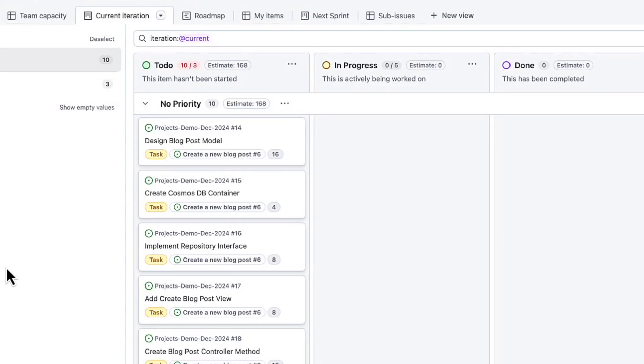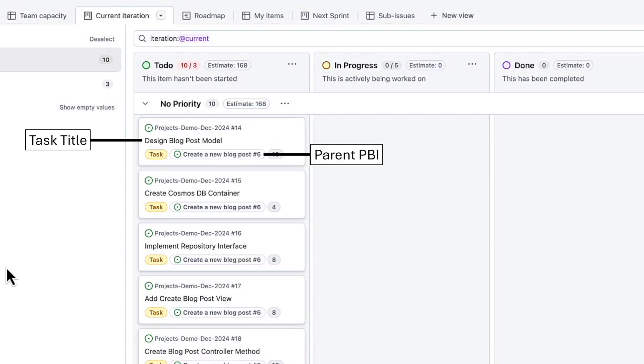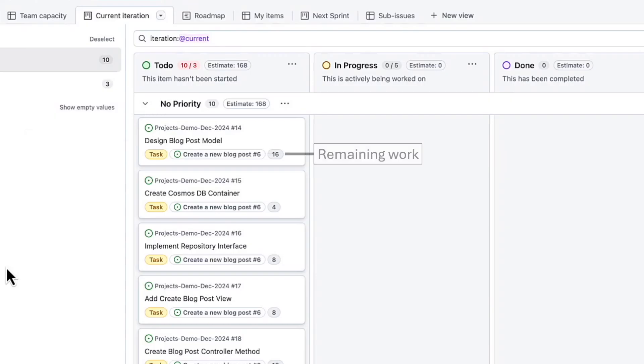Let's think about situational awareness for a second. This view shows the team a lot of stuff that they care about. First off, the columns give them a quick visual overview of which tasks are in which state, but then there's a lot of data that's on each of the actual cards. They can see the title, they can see the parent issue, aka the product backlog item for the task, and they can see the remaining work for this task. And then also up at the top, it shows them the total number of hours in each of the states for all the work they have in that state.